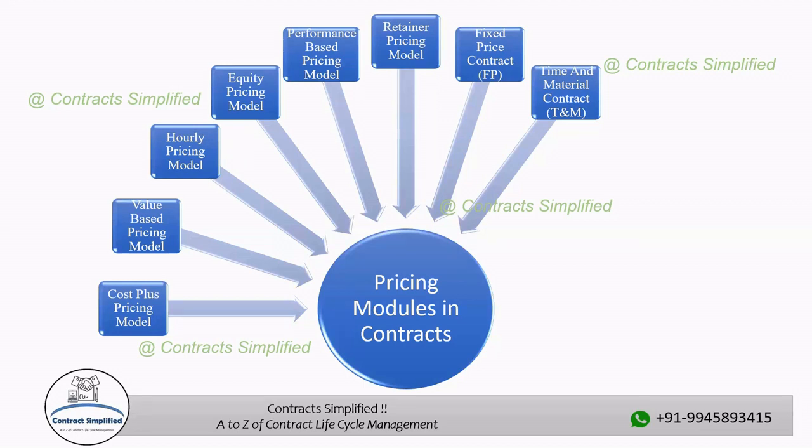Example: a contract that stipulates a $30 hourly rate plus an additional 10% on any item purchased. It also states that the buyer will not pay more than $1,000 in material and in excess of 80 hours of labor.